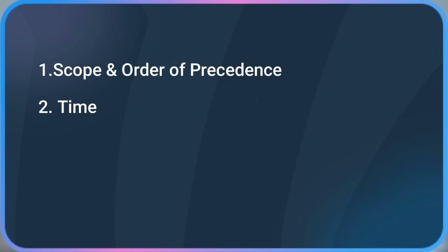This, for me, is always the most important one, which is what you're actually building and which documents define this, and the order that you need to interpret these documents, because construction contracts will always have hundreds of attachments, and understanding what order these documents define the work in is absolutely essential. You then have how time is defined, which would be the date for practical completion, the construction program, the responsibilities to maintain it, the liquidated damages, and how to claim extension of time.